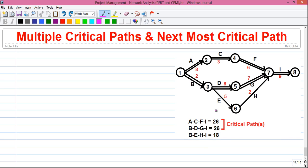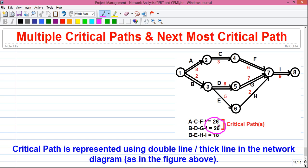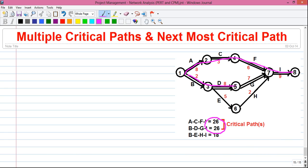So as I already mentioned, the critical path is the path which has the maximum time duration value. But in this question, we have 2 maximum time duration values and both are 26. So we have 2 critical paths in the network. One is A, C, F and I and second is B, D, G and I.